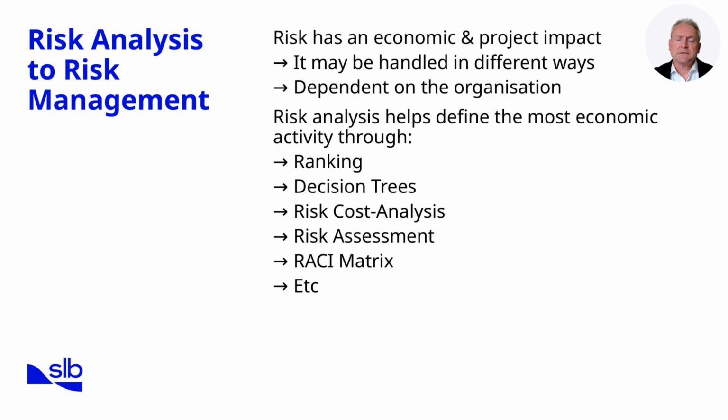Risk analysis by itself is only the first step. What matters is how we use that analysis to manage risk. The slide shows the transition from analysis to management, where the economic and project impacts of risk become the central focus. Every drilling project has uncertainty, but not every uncertainty translates into risk worth managing. That depends on the potential consequences. For example, a minor delay of half a day may not matter in the overall economics of a long well, but the risk of stuck pipe, even if low probability, has a severe cost impact and therefore must be addressed.